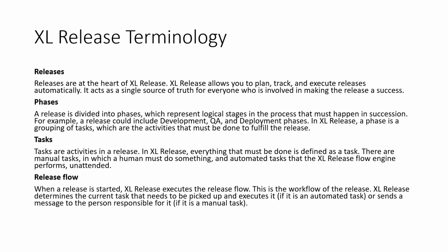I'll show you this in the demo time. Then next one we have is the release flow. What is a release flow? Release flow means, when you create a release, then you trigger the release. In that release, all the tasks and all the phases which execute, this is called the release flow. So this is the workflow of the release. Excel release determines the current tasks that need to be picked up and executed, if it is an automated task, or sends a message to the person responsible for it if it is a manual task.